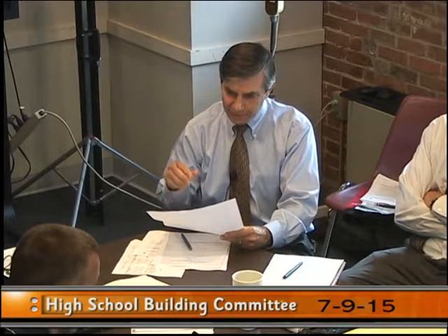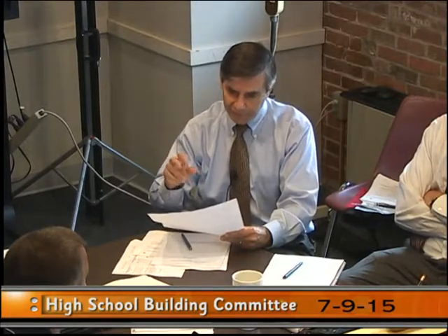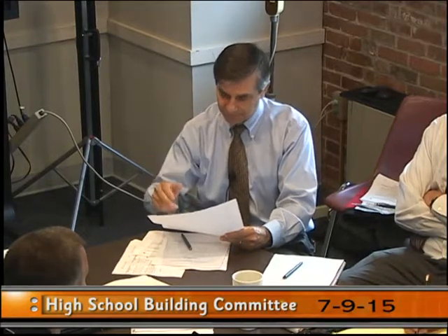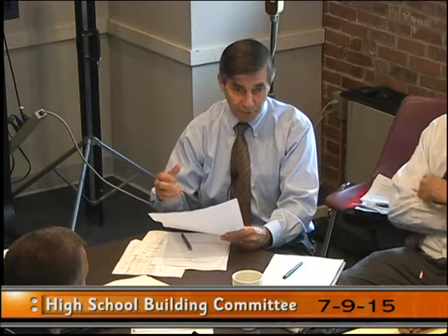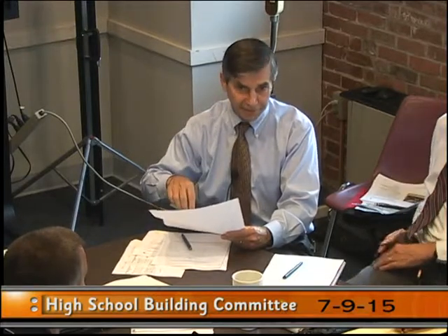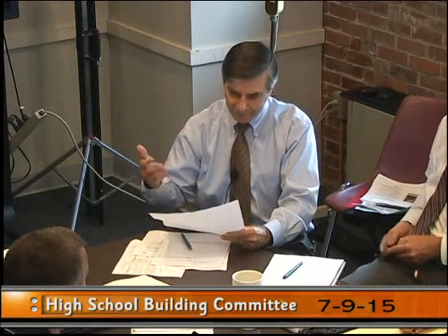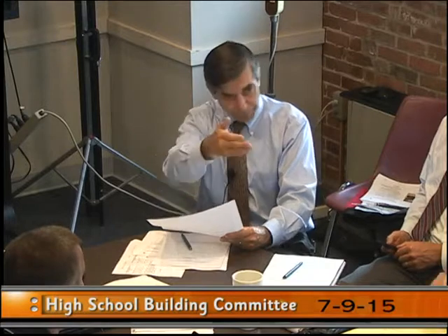And those guidelines are based on sometimes requirements, like the size of a general classroom, which is one of the spaces they have limits on. The size of a science lab, they have limits on. Some other things they're a little more flexible on, but in certain categories they are requirements. But it is titled guidelines. It doesn't mean we have to strictly follow it. In fact, they're suggesting we shouldn't necessarily just follow it. We need to develop an educational plan on our own for Stoughton, with the superintendent, the principal, and the people locally in the district to determine what is needed for Stoughton.